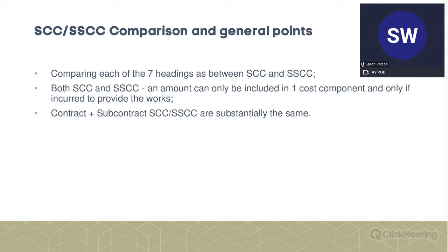Now, I think this is also helpful to contractors and subcontractors, because what I've found is often claims will be submitted under the schedule or the shorter schedule, and the PM will delete one because it will say, well, that's not claimable under that heading, it's claimable under another. Now, I think the pragmatic thing to do is just claim it under the other heading.